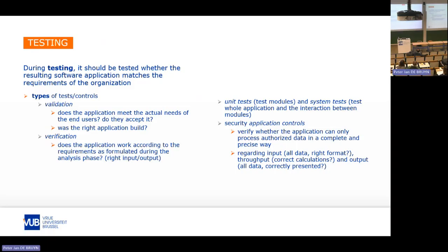Either the analysts, they didn't do a very good job, so they missed certain things, or they did not accurately represent them, or there might be an issue with the fact that, okay, maybe the project had a very long throughput time, a very long time spent to become realized, and maybe the analysts did a perfect job, but they made their analysis 2 years ago, and now customers or the end users, well, they have changed their behavior, the organization has changed, the market has changed. So these are 2 fundamentally different questions.